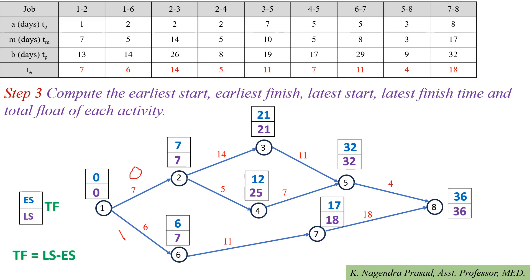Next, determine the total float for each activity, where total float = latest start time minus earliest start time. At event 1: 0 - 0 = 0. At event 2: 7 - 7 = 0. At event 3: 21 - 21 = 0. At event 4: 25 - 12 = 13. At event 5: 32 - 32 = 0. At event 6: 7 - 6 = 1. At event 7: 18 - 17 = 1. At event 8: 36 - 36 = 0.